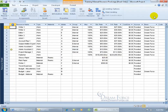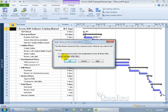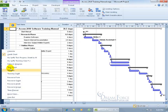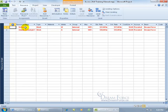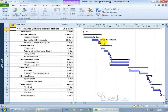Let's close out, not save, close the resource pool, go back to the folder, and open Access 2010 — this time without opening the resource pool. Right-click the view bar, go to the resource sheet, and you won't have the other resources. The existing ones show in red because they're still assigned to tasks in the Gantt chart, but they're not connected to the resource pool. So I recommend you always open your project along with the resource pool to maintain the connection and see if resources are in use by another project at the same time.